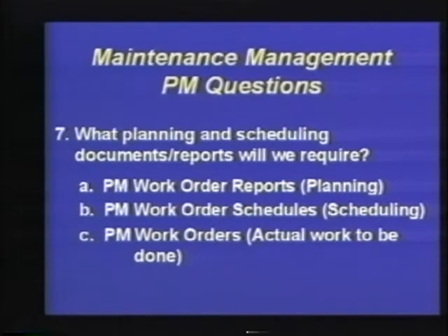Plan and then schedule. Then we actually develop the work order data, the PM work order. What's required? And these are all of the steps. Now, the 4 basic steps are preparation, as I've identified before, travel to the job site, perform the actual PM task, and then travel from the job site.